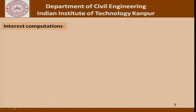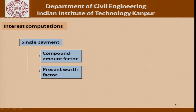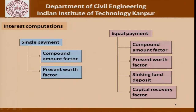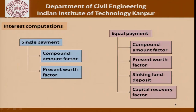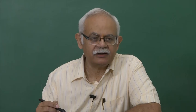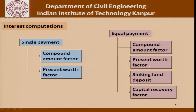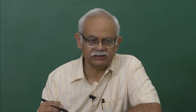Now let us understand how to do interest computations. There are two classifications: single payment, where we talk about a compound amount factor and a present worth factor; and equal payments, which include the compound amount factor, present worth factor, sinking fund deposit, capital recovery factor, and so on. These are simple factors determinable from first principles, but tables are readily available for engineers to find the factor to multiply a certain income or expenditure to get the present worth.